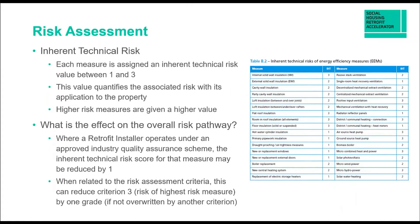The inherent technical risk (IHT) of measures is important to understand. The table on the right outlines the IHT value for each measure, given a number between one and three. This value quantifies the associated risk of applying that measure to a property — higher-risk measures get a higher value. For example, IWI carries a high risk of interstitial condensation, so it's given an IHT value of three. By contrast, applying a hot water insulation jacket to a cylinder is very low risk and is given an IHT of one.